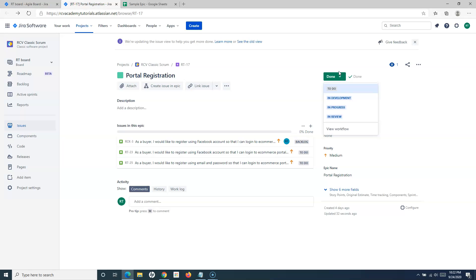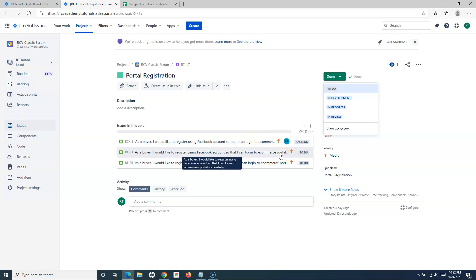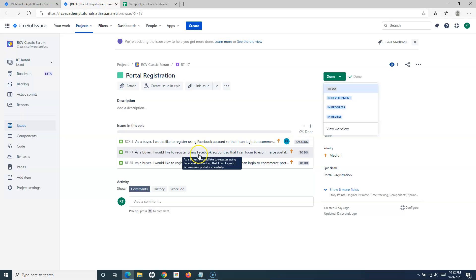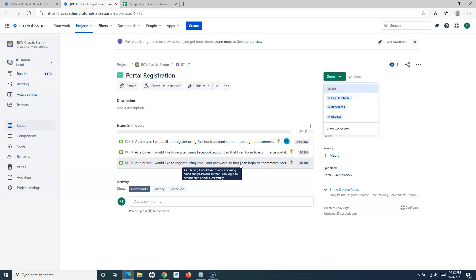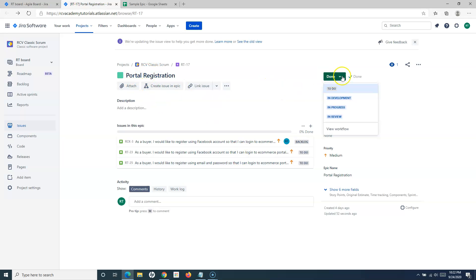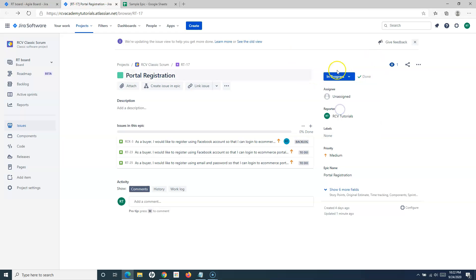I marked this epic as done just to show you how you will close it, but this can also be done automatically once all the issues within the epic are closed. In your workflow you can define that as soon as all the issues within a particular epic are closed or moved to done, that epic's status automatically changes to done.